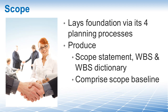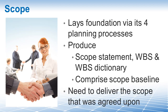One important fact: according to PMI, you only need to deliver the scope that was agreed upon. So if what you deliver matches the documented requirements, then you have successfully completed your project. The project scope is really the primary focus of your project. Scope is the basis for describing the necessary work to complete, and your scope management plan defines how the project scope will be defined, developed, and verified, as well as how the work breakdown structure will be created and defined.